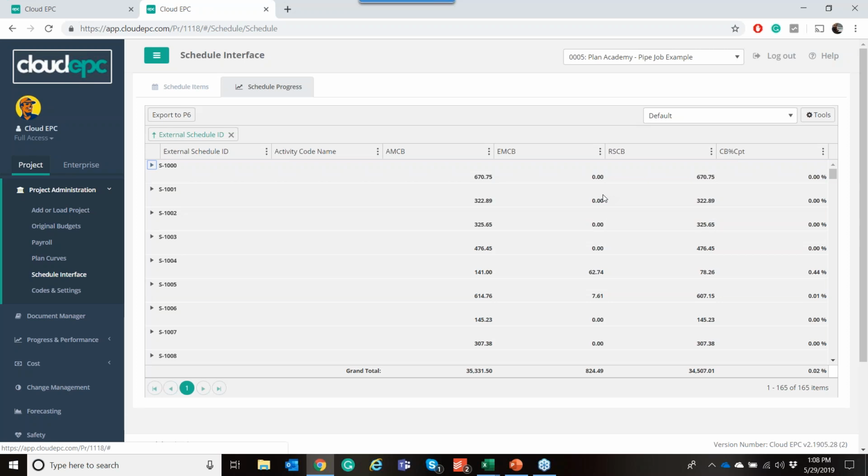I would argue, coming back to my slide deck, that physical percent complete, if it's not really grounded in units, is subjective. And I'll also come back to my slide deck that says if the owner's team is perfectly happy, and you're down to the hour on a turnaround, I mean, the juice is not worth the squeeze. So a tool like ours or a fancy spreadsheet's not worth the time. And I just don't think that's the right application for a software like this.